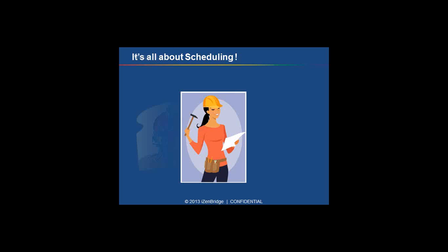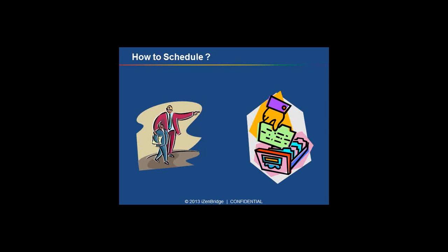So to solve this particular problem, we can follow 2 approaches. The approach one, which we have been following traditionally, is that we have a detailed work instruction. We make a detailed list of activities and provide to our workforce that you have to do this task by this much time. The other second possibility could be that we have a list of work visible to them. So you can think like a packaging floor where they know that these many orders or goods are there in their inventory. They just need to pack them and start dispatching as they have capacity available. And this is how these two schedulings are a bit different.